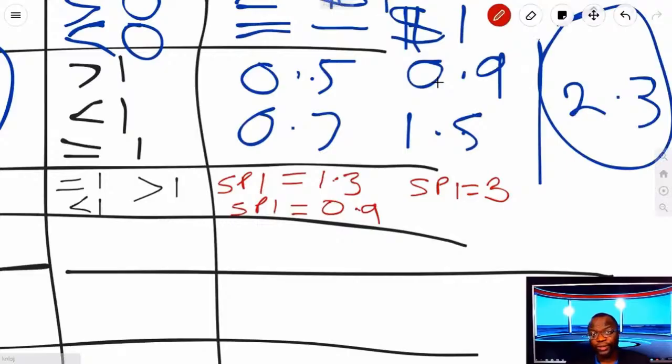That's not good. So management will say, what's going to happen to the 10 cents worth of work you didn't perform? And if you multiply that across millions of dollars, you're really late. Okay, so this means you're behind. SPI equals 3 means you plan to get a piece of work done and you got 3 times the amount of work done within the time period.